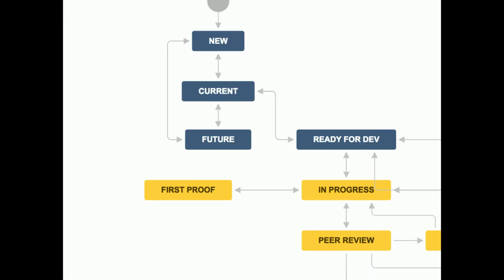So by creating the first proof status, I was able to have the business clearly see tickets that needed something. So it was that person who's so busy, but they might have a second to take a look at my sprint board to see, oh, okay, here's my first proof column. Let me take a look at these tickets. And then it was also helping all of the other people in the organization put pressure on that person instead of us, or help that person by saying, let me take a look at these tickets. Can I provide the feedback that you need? And so that was a change that came out because of a bottleneck that we had. That was the word I was trying to find, but I couldn't find earlier. Bottleneck.